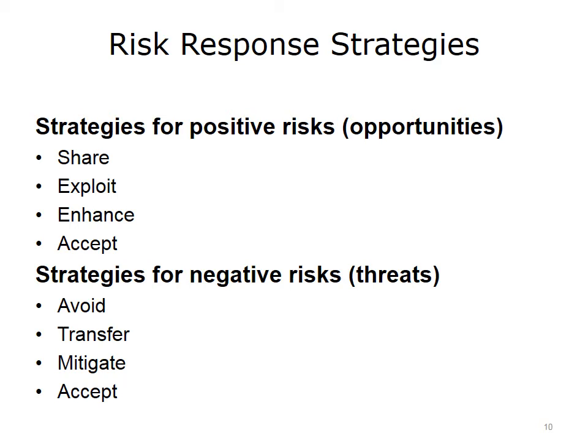After you have analyzed and prioritized your project risk, the next step is to consider your risk response strategies. Your goal is to encourage positive risks and reduce negative risks to a level that still allows the project to achieve its objectives. Even if the risk you are facing is a positive one, you still need to manage it to the project's advantage. In this case, your strategies are to share, exploit, enhance, or accept the risk.